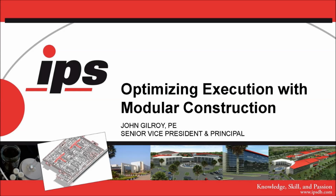Of course, things getting done within a shop are going to have better quality control than on a job site, just from the location of the workforce, as opposed to where things are getting delivered, picked up, fabricated. You'll have simplified site logistics, less people on the site. Reduced project time will be a definite savings for the overall project from the duration, for general conditions as well as startup time.